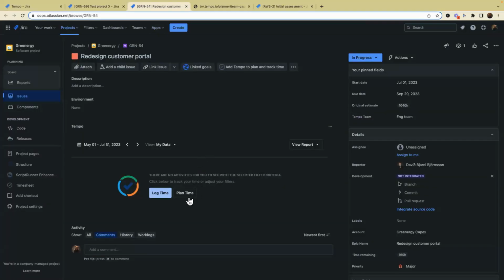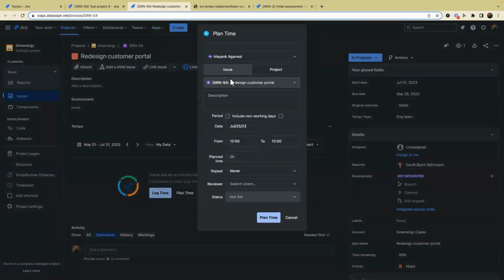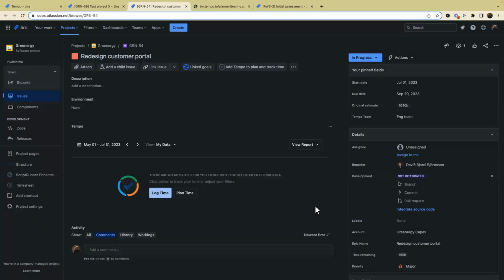So for example, if you create a plan from here, actually, from here, I don't go into the Tempo tile. I'll go into the native Jira tile, if you understand. On the top right, you will have start date, due date, original estimate from there. Yeah, so I think this original estimate is not tied to your planned time for a resource, right? So this original estimate is only populating your team level plan. So this epic for this particular team has this original estimate as a high level plan. So it doesn't really impact any of the plans for a particular user because it's a team level plan.